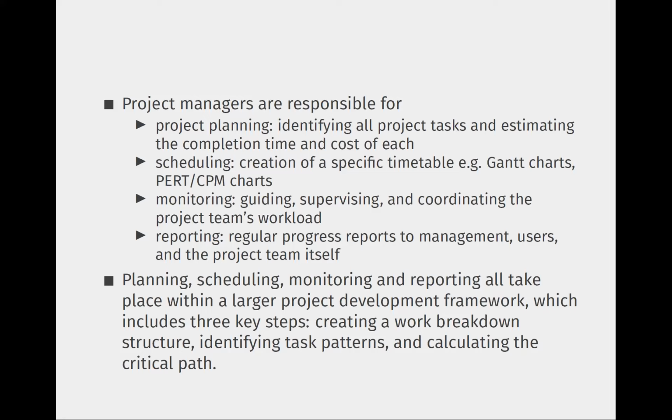First one, the project plan. So you have to identify everything from beginning to end. These are known as tasks. Now let's say you are going to develop a software system. You need to develop the database. Then you do the coding, right? Then you write SQL statements for coding and so on. So planning together with the time frame, maybe the first one 2 weeks, the second 1 week, and so on, right? So project planning is a must. So identify all the tasks and estimate the completion time and cost of each.